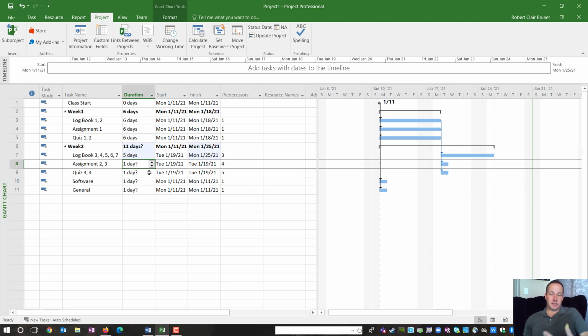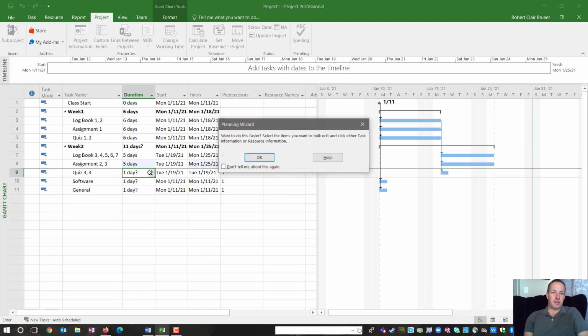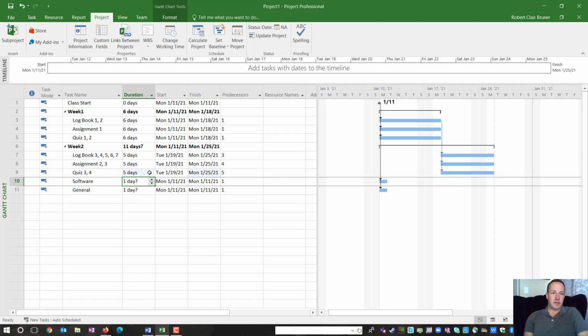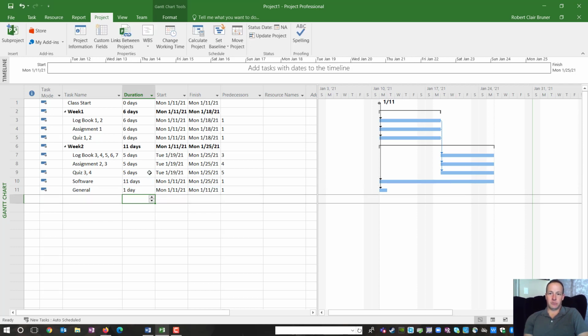And we have this set to a 5-day work week. So 5 days puts us on that Monday. Now we're down here to our discussions. We need to make these due on that same Monday, but because we've been working on the discussions for 2 weeks, let's go ahead and plug that in for, I guess, 11 days. We'll do the same thing.